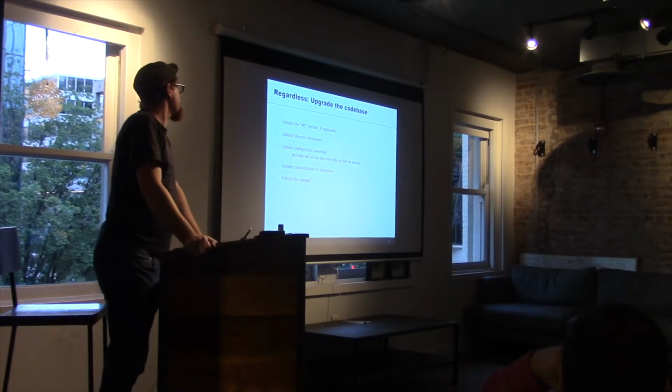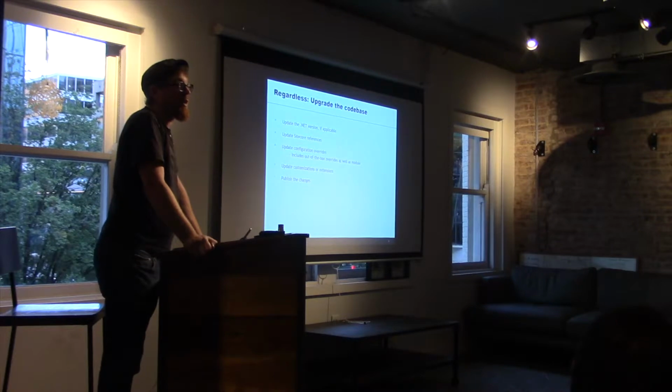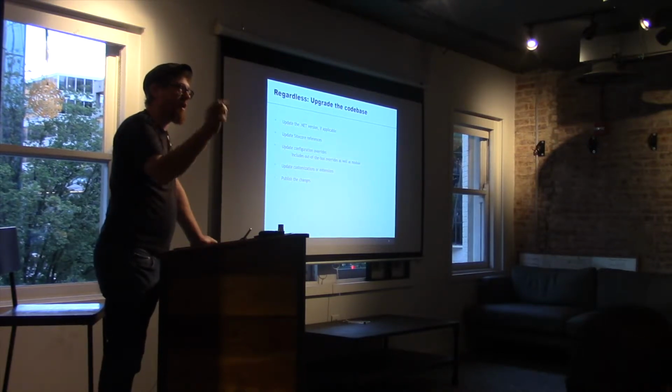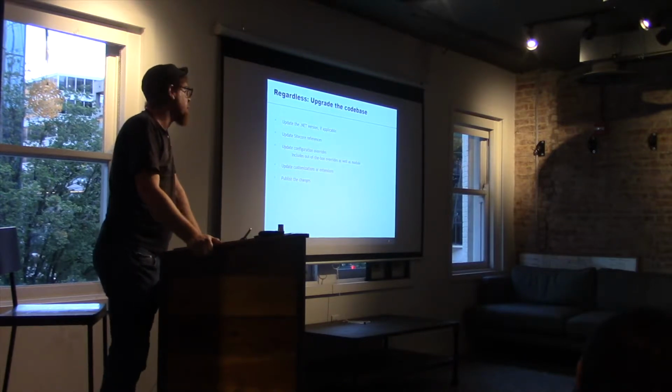Okay, so no matter what you do, you've got to update the code base. And you were asking about a really complicated site. The more complicated the site is, the more complicated your code is, the less likely that this is a tool that you're going to be able to use. The important thing about doing upgrades in general, and trying to get a good cadence on it, is that it allows you to actually upgrade your site instead of rewriting it. If you spend too much time maintaining a site and not upgrading the platform beneath it, you're going to run into a rewrite, because you get stuck on a version since you have too much custom code and you never upgraded it. Eventually you can't upgrade it.